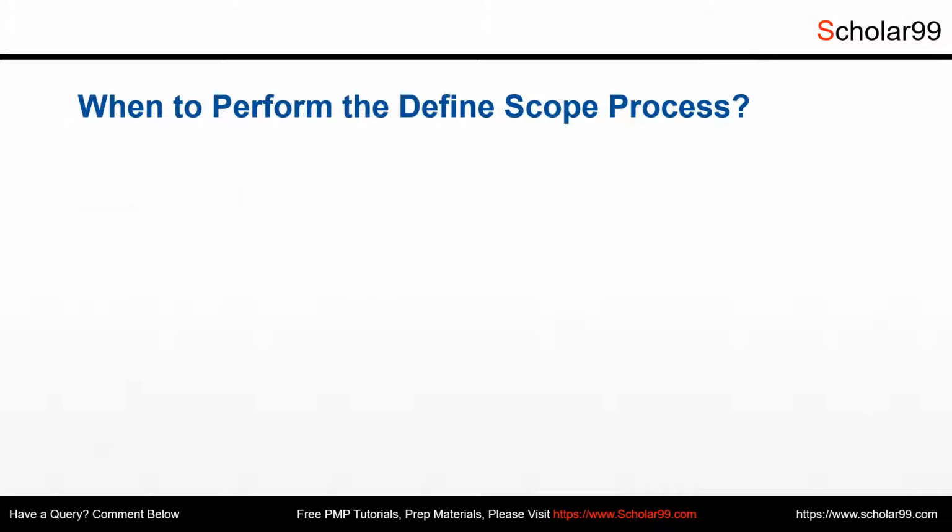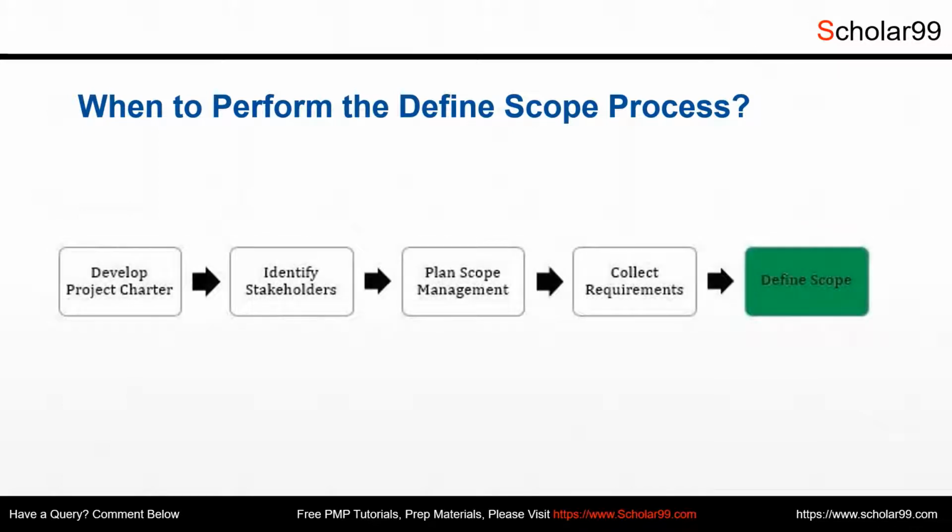Project charter is an output of develop project charter process. Project Charter is the first document created in the project. It contains all high-level and precise information that is available during charter creation. It contains the following things, but not limited to: project objectives, high-level project scope description, which includes both in-scope and out-of-scope items, a brief description of the project manager if already identified during the charter creation, high-level schedules and milestones,